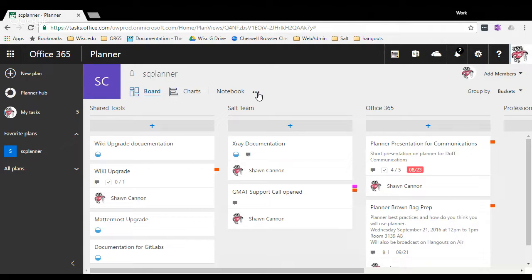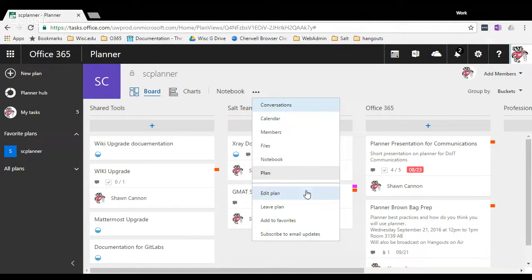When you're creating the group, you have that option of subscribing members to the email. Yes. That ties into it, and you are in the planner section. You see that in the back, you have a subscribe to email updates option. You click on the menu of the plan. Subscribing to that will get you direct emails for the plan updates. So if you are subscribed to both the group and the plan email updates, you'll get kind of a double dose of everything that's going on in the plan. So just be mindful that there's different things you might want to unsubscribe from to keep the chatter down.